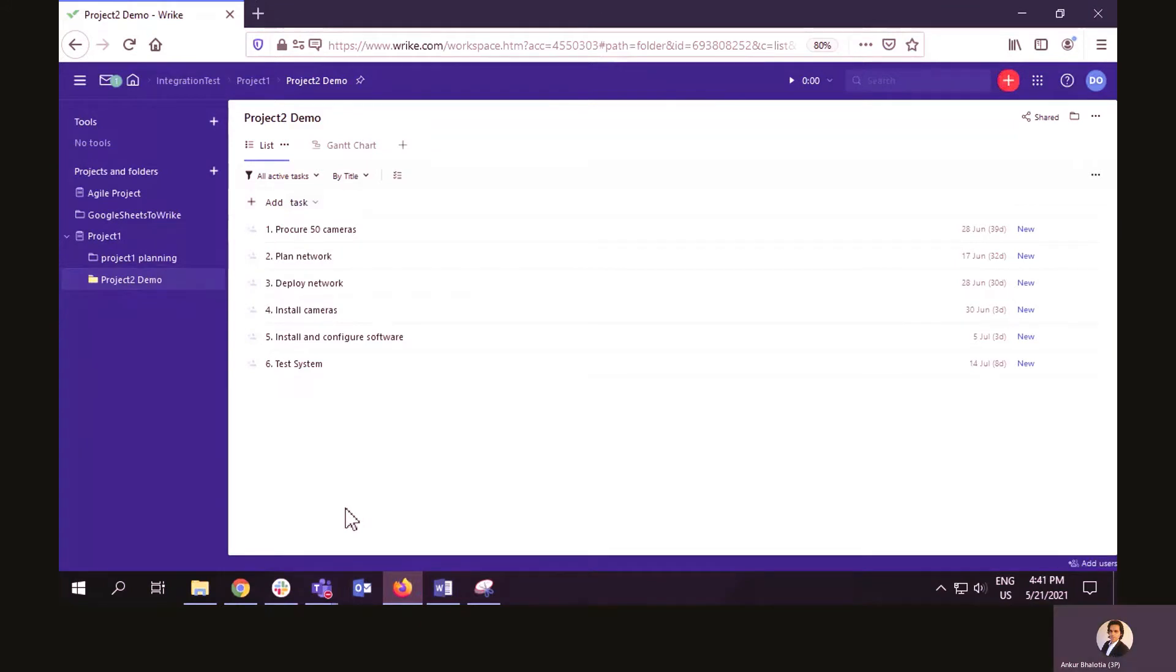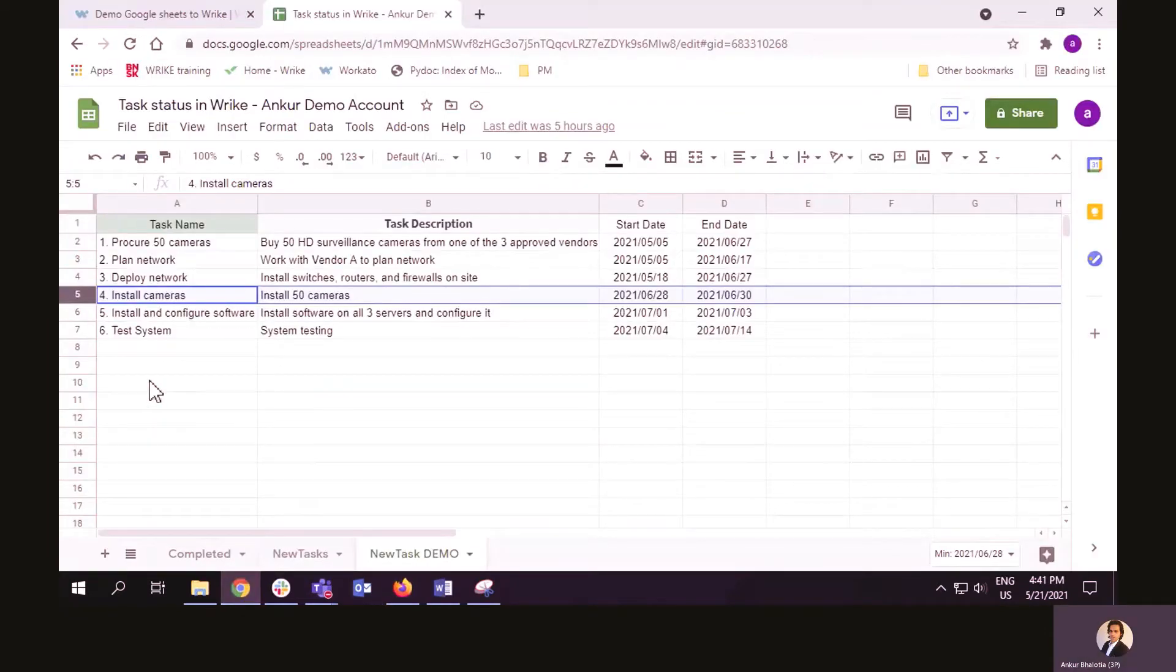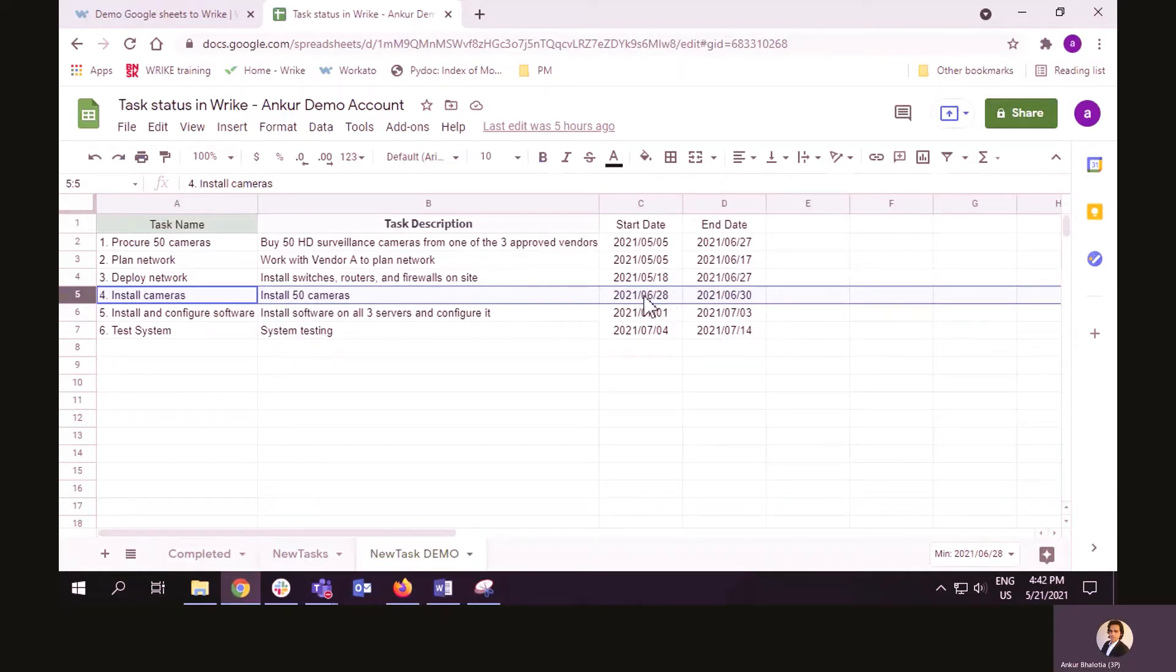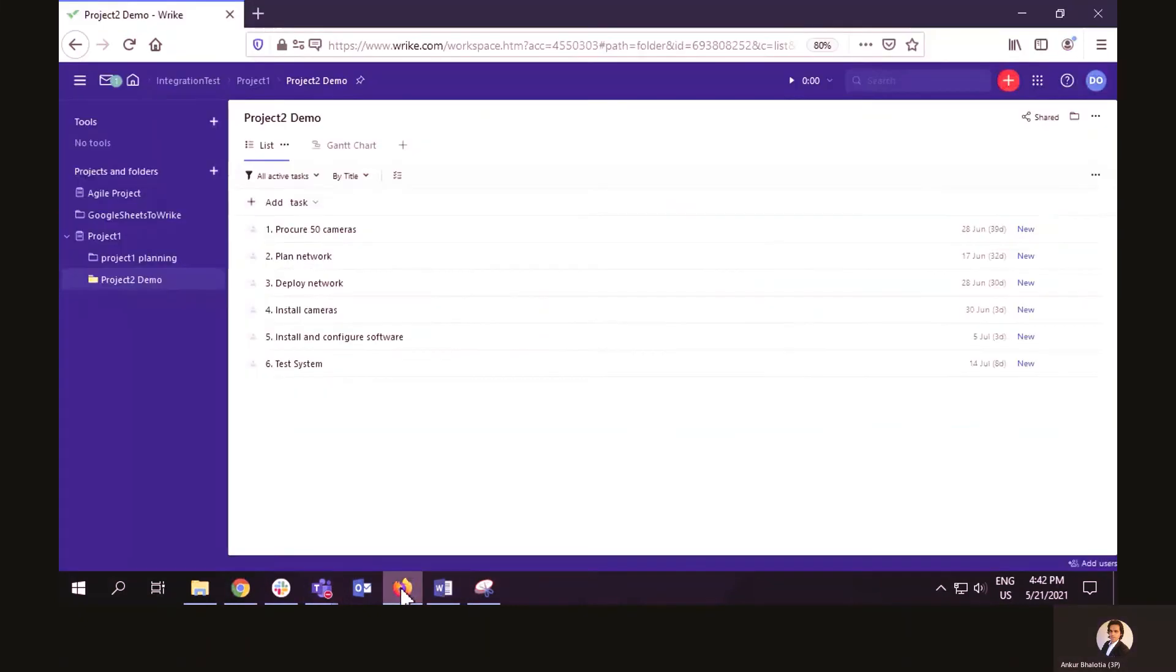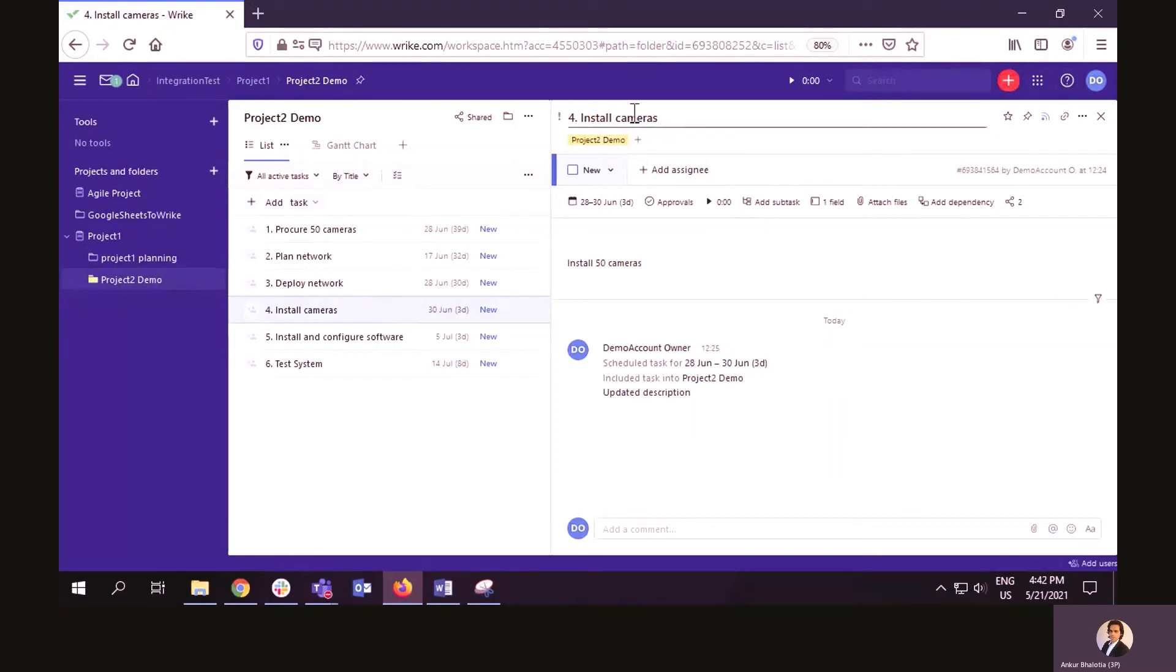And finally, we will check the data in Wrike and make sure that the data in Wrike is the same data we have in Google Sheets. So, let's look at a task in Google Sheets. Let's say task number four, install cameras. Task description is install 50 cameras. Start date is 28th of June. Finish date is 30th of June. So, let's look at install cameras. Title is correct. Description is correct. Start and end dates are correct as well.